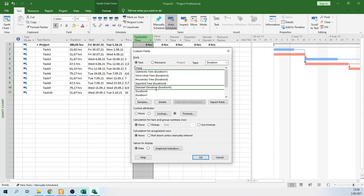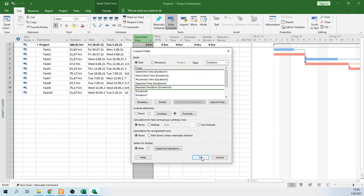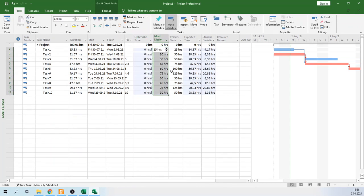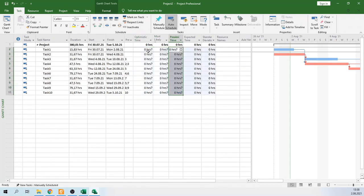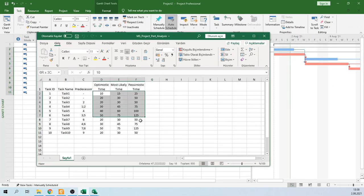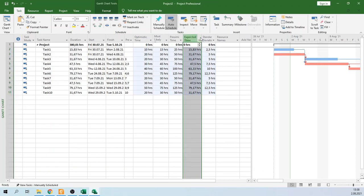For standard deviation, define the formula — I defined it beforehand — and click OK. The next thing to do is enter the optimistic, most likely, and pessimistic time data into the project. From the Excel sheet we simply copy the data and paste it here. MS Project automatically calculates the expected time and standard deviation.